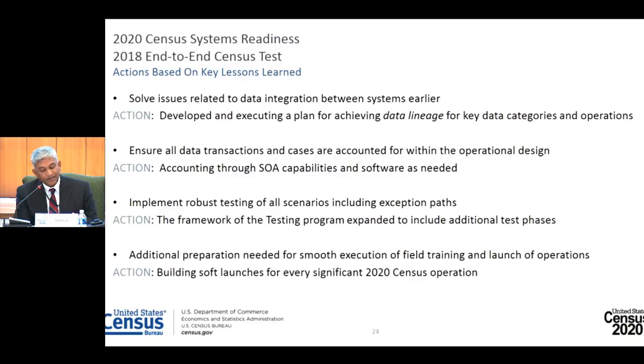Finally, regarding the mitigation plans to address the fourth bucket under lessons learned, we are building soft launches. Already Al mentioned this. The soft launches are in the schedule for every significant 2020 census operation involving respondents, field representatives, or call center agents.